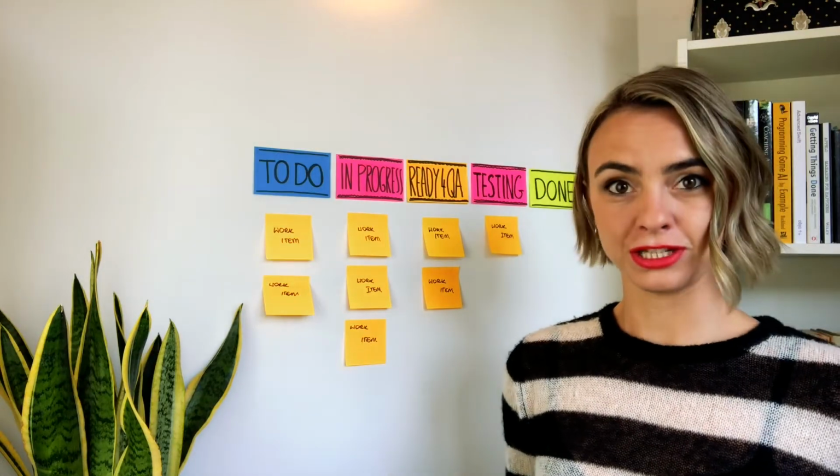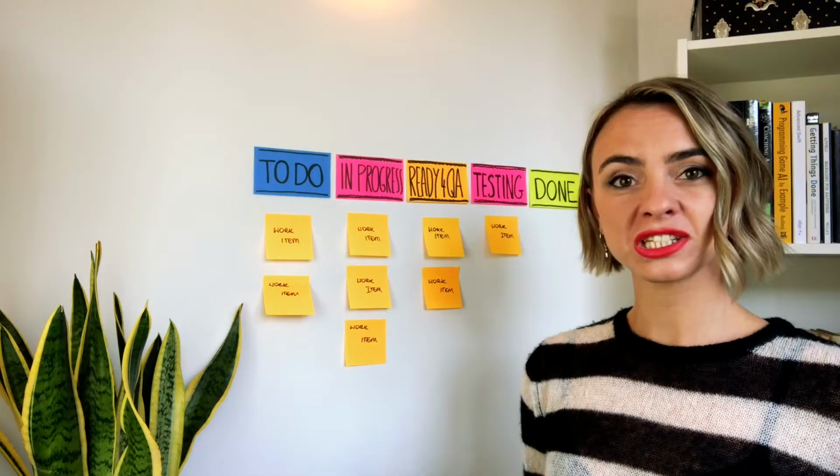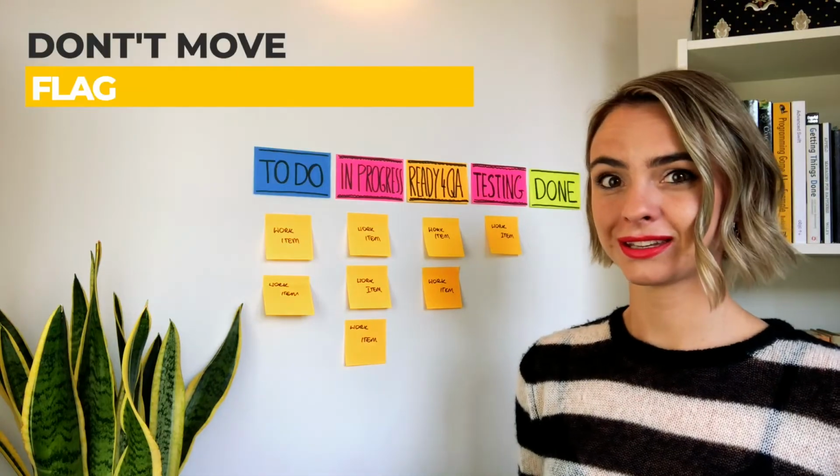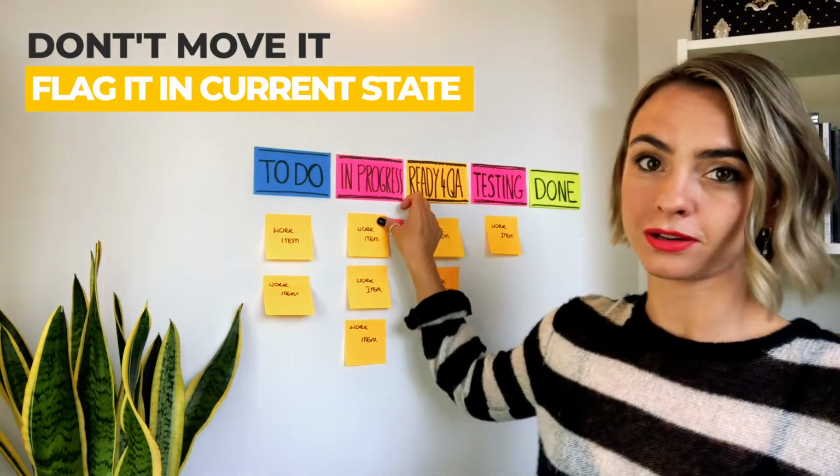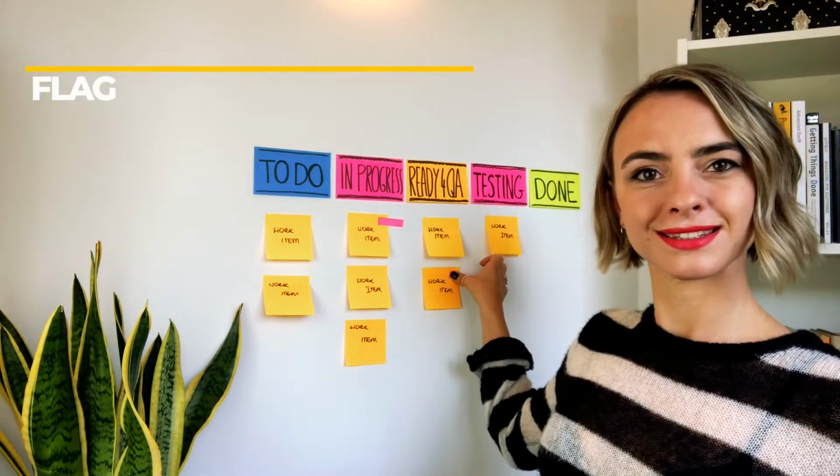Evidently, to unblock an issue, it would be helpful to know at which stage it got blocked, don't you think? Don't move it. Flag it in the state that it got blocked, like this and like this.